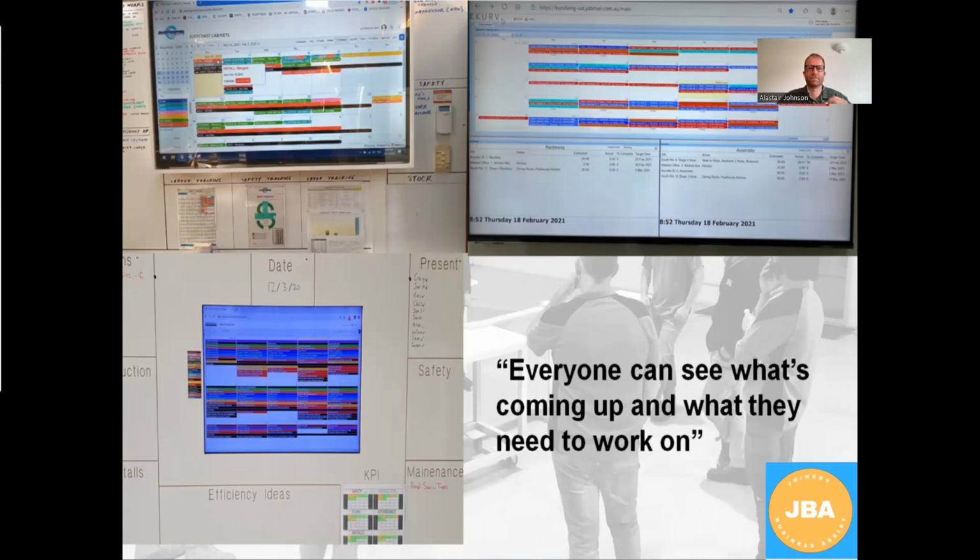And time and again people have done that, and time and again, sometimes you aren't charging the customer enough. Those hours that you're estimating and those labor hours that you're charging for aren't enough, but without having them tested and a bit of a feedback loop, you're never going to find out that you're not setting enough time. Or, even worse, you've got a super skilled person who's the business owner and they're really committed and they can do something in 5 hours, but someone else can't.